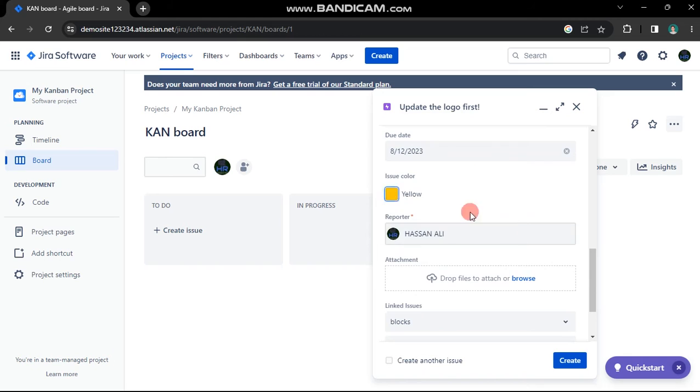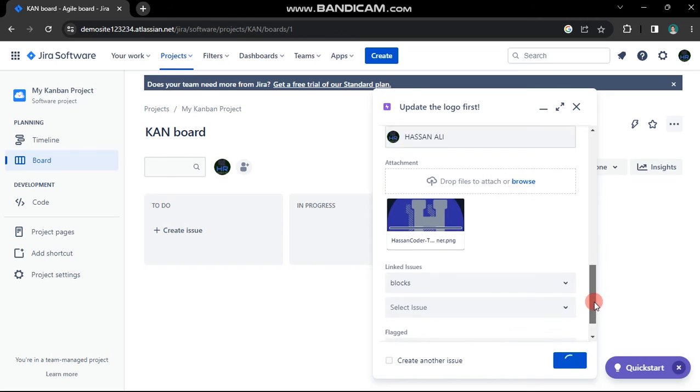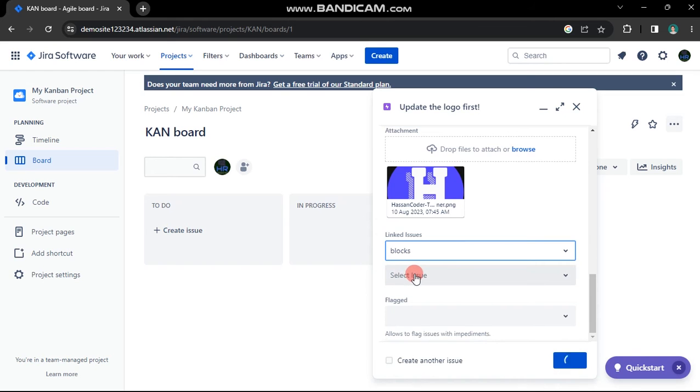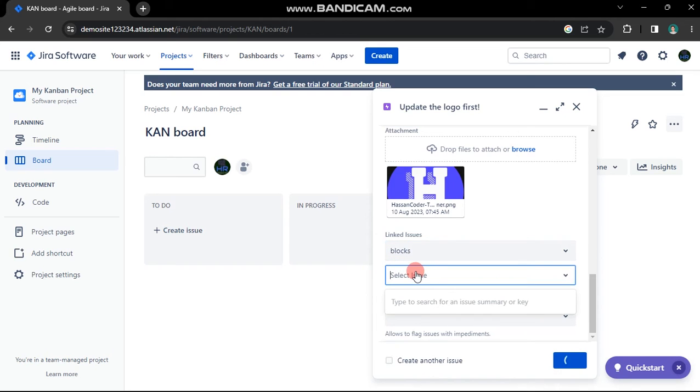Now scroll down to the bottom. You'll encounter linked issues. Many options are showing, so make sure to select blocks. This is pivotal, as we're about to block a story.